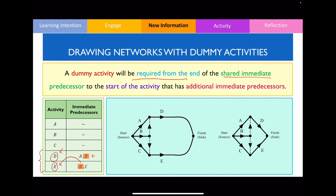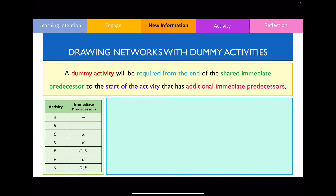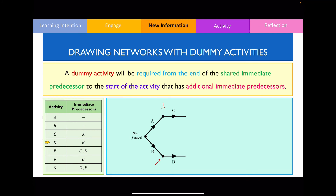Let's look at one more final example. According to the precedence table we can start from two activities, A and B. So I draw a starting vertex with two edges labelled A and B. Once activity A is completed, I can move on to activity C, so I draw a vertex and edge labelled C. Once activity B is completed, I move on to activity D. Examining the next rows, both activities E and F share some immediate predecessors but not all — so I'll need a dummy activity again. I draw edges connecting E to D and F to C.